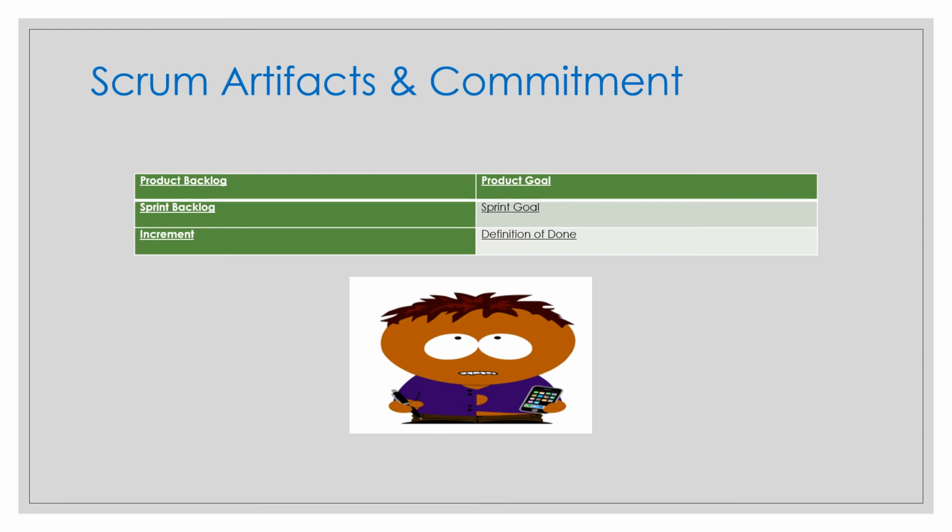The sprint goal is a single objective of the sprint. Although the sprint goal is a commitment by the developers, it provides flexibility in terms of the exact work needed to achieve it. The sprint goal also creates coherence and focus, encouraging the Scrum team to work together rather than on separate initiatives. The sprint goal is created during the sprint planning event and then added to the sprint backlog. As the developers work during the sprint, they keep the sprint goal in mind, and if the work turns out to be different, they collaborate with the product owner to negotiate the scope of the sprint backlog within the sprint without affecting the sprint goal.